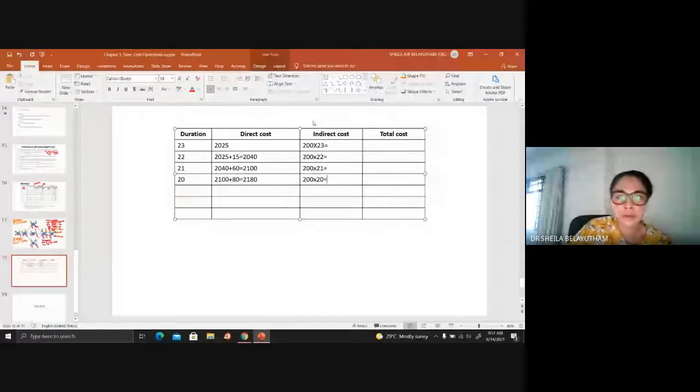So you should get 4600. Right, so 4200 and you should get 4000. Okay, so your total project cost will be the summation of direct cost and indirect cost. You add these two together. Okay, so you should get 6625 here.